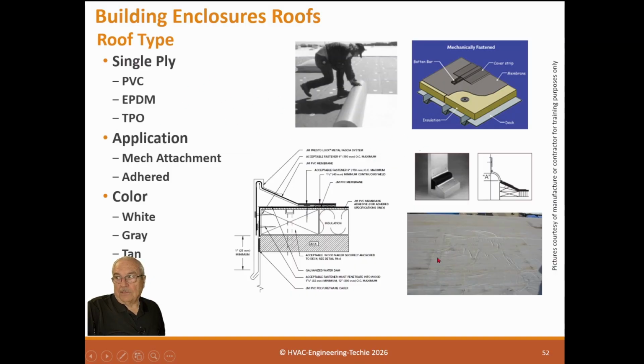This is one of my commissioning jobs, and you say, well, how did that ever get installed like this? I don't have that answer, but what I did find important is the general contractor never looked at this roof. The reason was it's hard to get to this piece of roof. This roof did not have an access hatch. You had to get there by a pretty long ladder. I crawled up there to just see what this was like, and saw this roof and took a picture, and the general never looked at it.